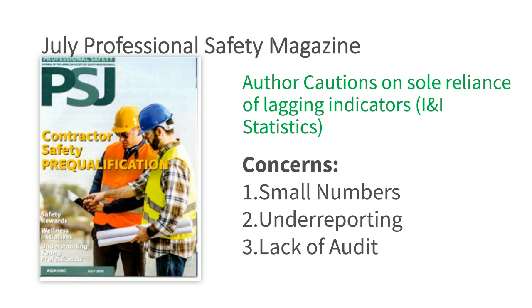Contractors understand that if your organization sets a firm bar at, say, a total case incident rate of 2.0, if they exceed that, they're not even going to get on the bid packet. They're not even going to go any further in the pre-qualification process. They understand that, and I've heard this many times from contractors, talking about the challenges and pressures they have in terms of the reporting of accidents and the classification of accidents that ultimately they would have to report. So that's a real problem when we're using injury illness data.